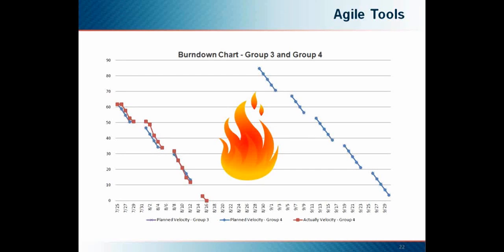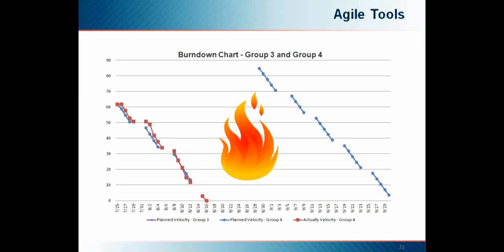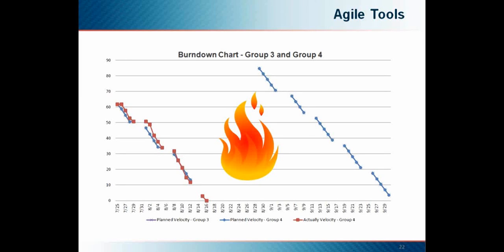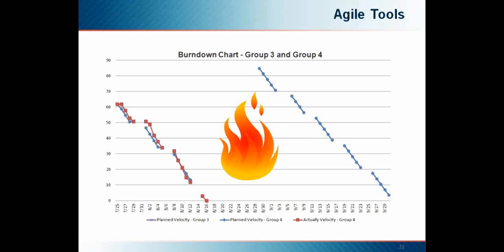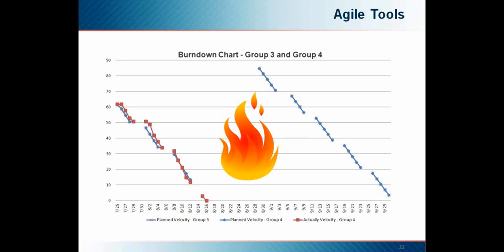Well, what you see are 2 sprints. The blue lines indicate the planned effort, and the red line shows the actual progress. After the tasks are estimated, the amount of effort the team can produce every day is indicated in the slope of the planned line. This is often referred to as the team velocity. This chart is updated daily and progress reviewed. Issues preventing a task from completing on time become immediately evident and can be managed appropriately.